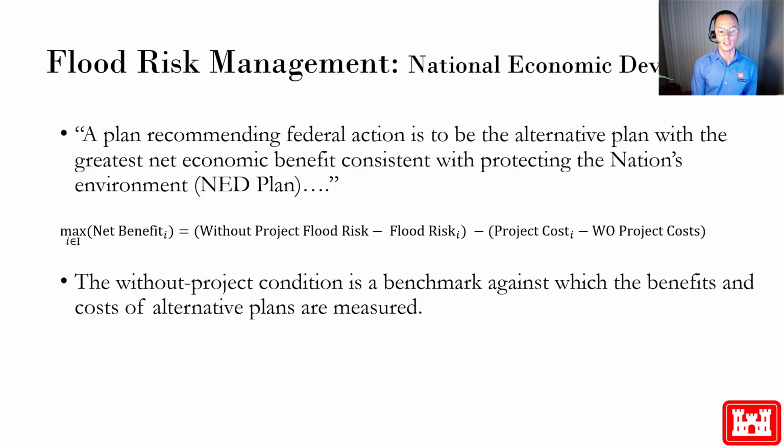So that's the project costs less without project costs. The without project condition is a benchmark against which the benefits and the costs of alternative plans are measured. We equate this measure, the net economic benefit, with public benefit and equivalently with the federal interest.